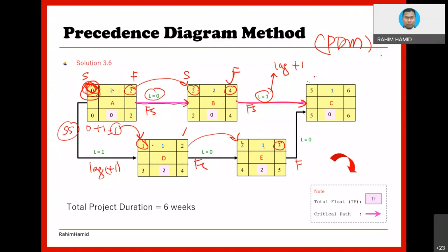So curing doesn't have any specific activity except that you pour some water and then you cover by gunny sack, or whatever it is, so that it doesn't dehydrate very quickly. So it doesn't involve really activity, but then it is necessary. So you can utilize inside the PDM diagram using this concept. But then you have to account for it in the calculation.